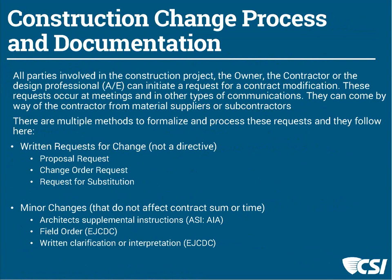Sometimes there are minor changes that don't affect the contract sum or contract time, but these too need to be formally documented as a change to the contract, even though they are minor. Those may come in the form of supplemental instructions that the architect or engineer issues, or as clarifications or interpretations made during the life of the project.